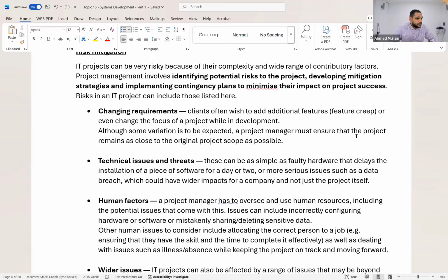Okay, when you're dealing with the project, guys, you need to understand that people can leave you whenever they want. Is it clear? You have to be aware of it and you have to prepare for it. Sometimes, guys, they hire more than they need because they have a fear that 1 or 2 of them might suddenly leave in the middle. So sometimes they have what you call standby developers. If one guy leaves, then this guy will take over the project. Okay? Right. Can you guys read it?